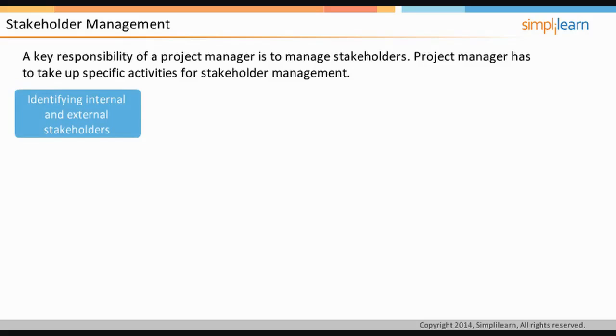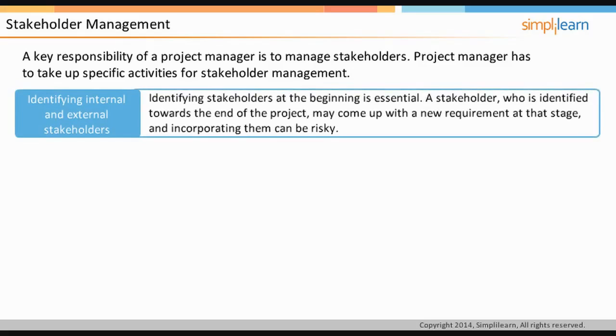Identifying both internal and external stakeholders. Missing out any stakeholder can be disastrous for a project. A stakeholder who is identified towards the end of the project may come up with his own requirement at that stage, and incorporating them can be risky.